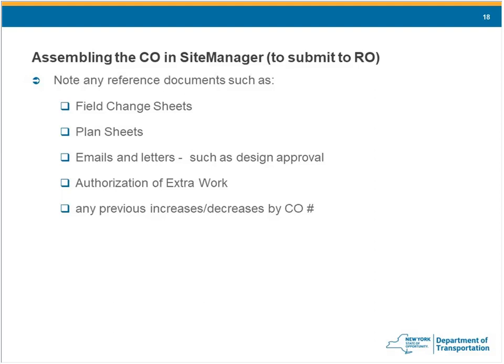Eric, we have a question. Are field change sheets still needed to be added to the contract by change order, even if they have a zero cost impact? Yeah, we like to get them because by attaching it to a change order, you are then officially incorporating that change into the contract.